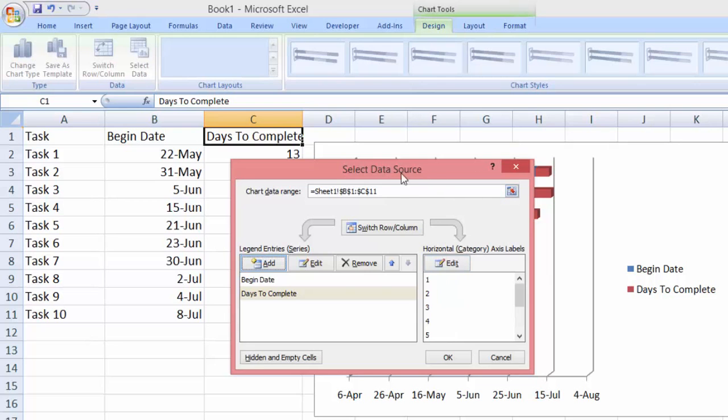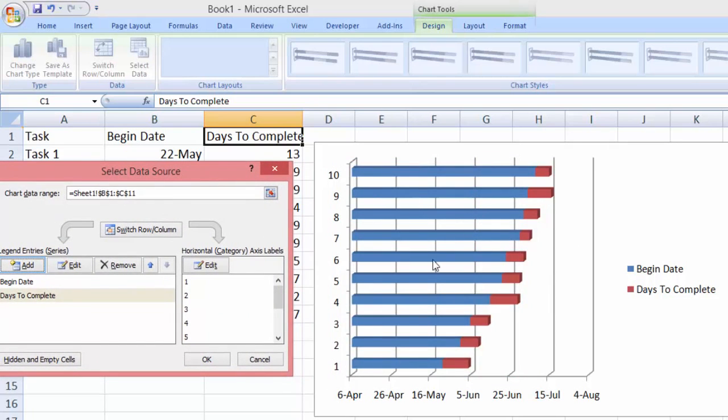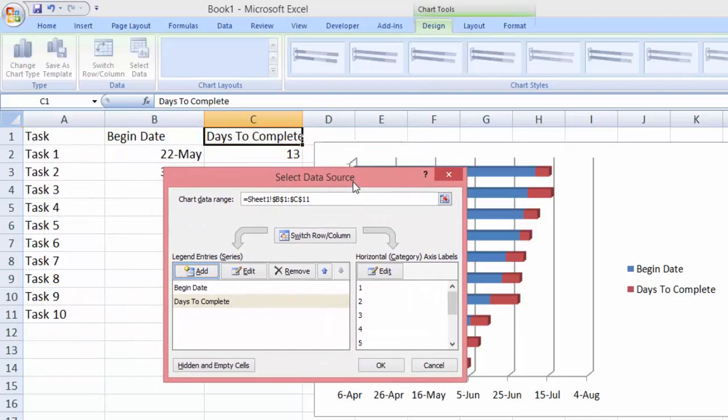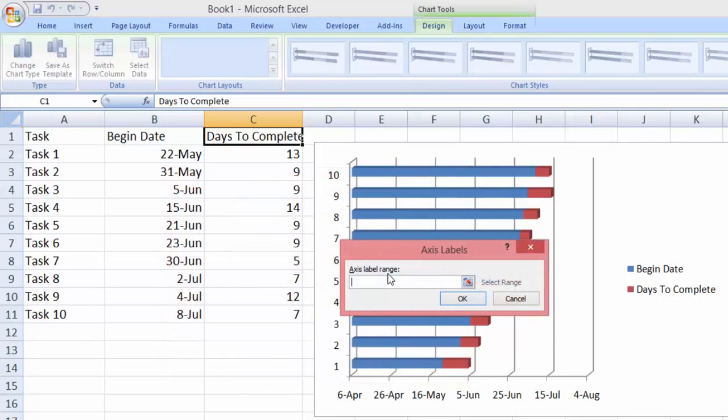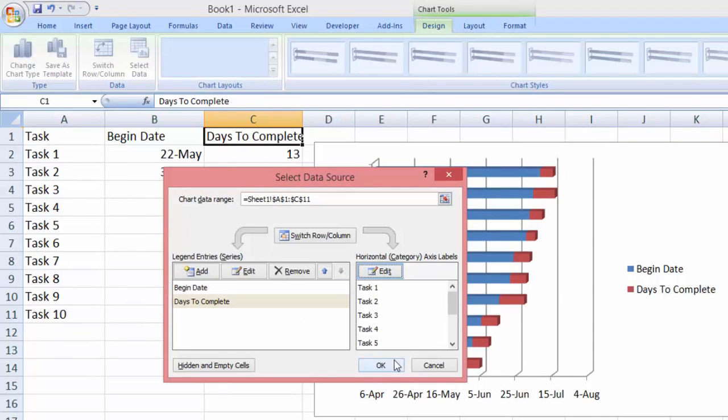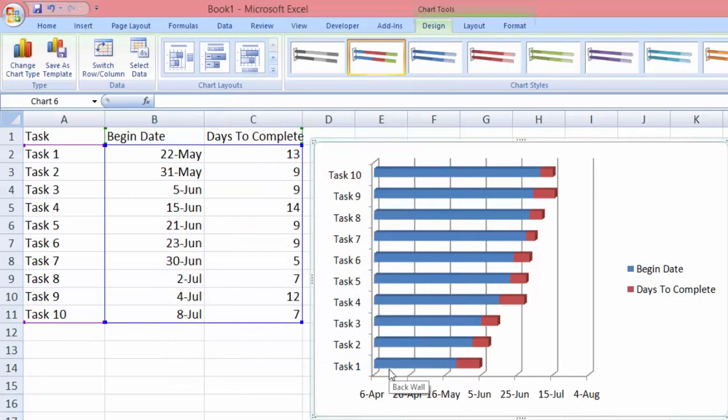Now as you can see we have a more complicated chart. The next step is to go to the horizontal axis label right here. We will select edit. So a box will appear asking us to choose the axis range. Here we're going to choose task 1 to task 10, and click OK. We're going to click OK for this box and now we have all our data.